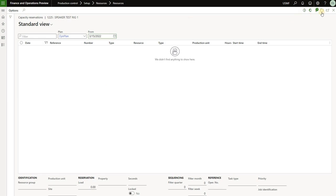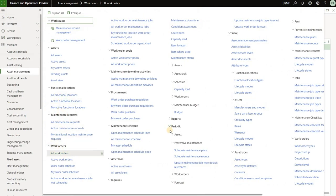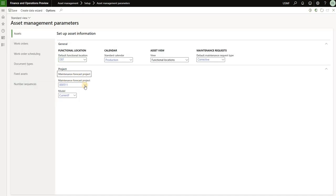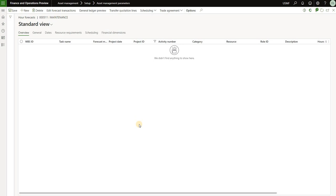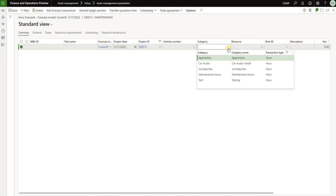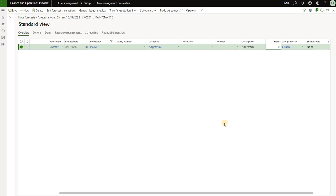Now let's see how we can generate capacity reservations. It's important because we want to understand which activities inside EAM module will book capacity of that production resource, preventing us from scheduling production orders during those activities. Keep in mind resource 1225 is finitely managed. The first thing that will generate a capacity reservation is an hour forecast that is scheduled. What I showed before was just an hour forecast that was generated but not scheduled on any resource. I'll come back to the enterprise asset parameters, open the maintenance forecast project 5.11, and navigate to the forecast. I'll generate a new hour forecast for today's date 3.17, select a project category such as apprentice, and book 11 hours — representing planned maintenance that should book the capacity of that resource so it's not available for any production job.